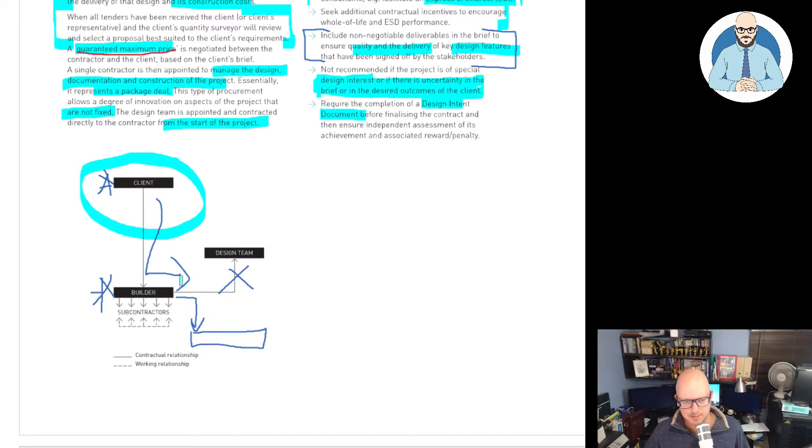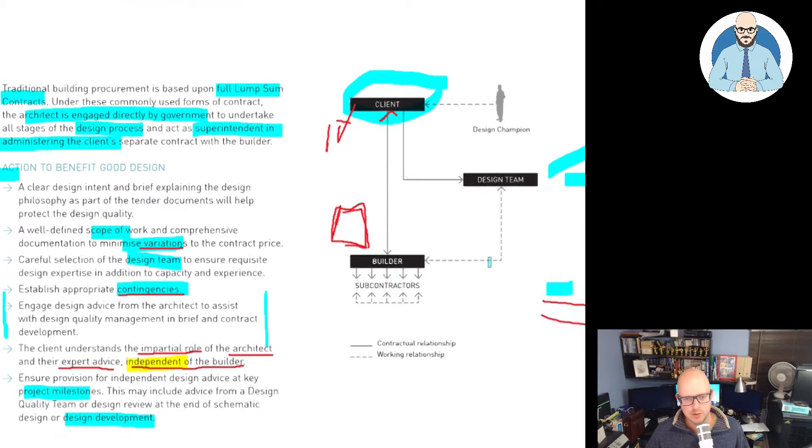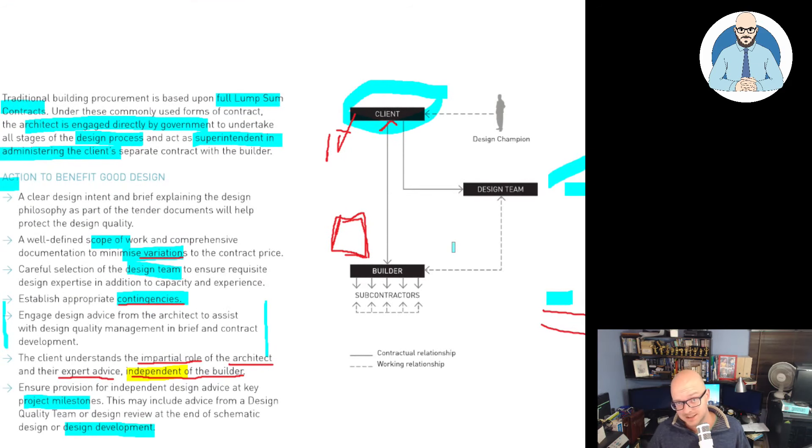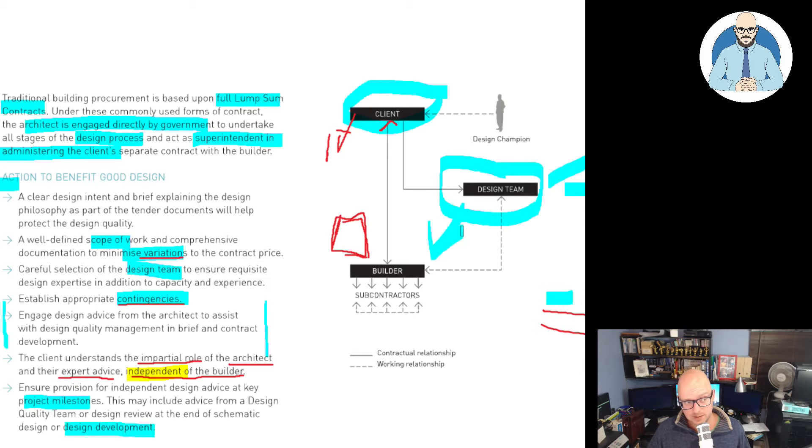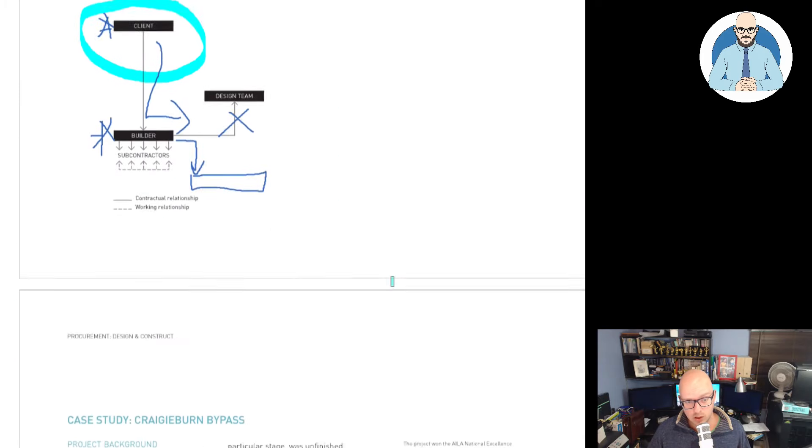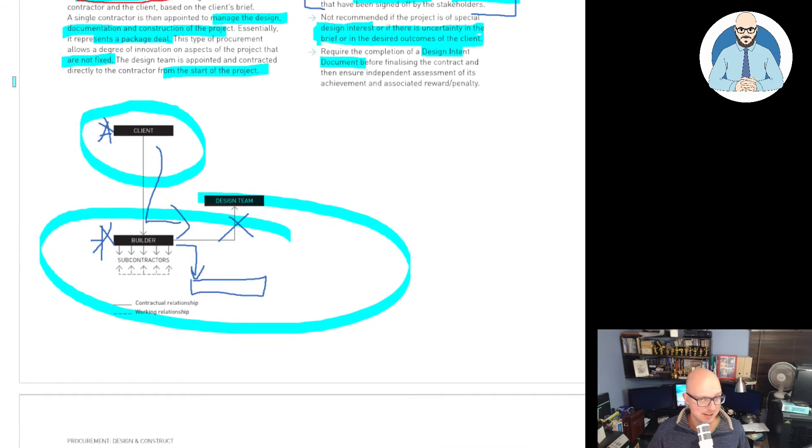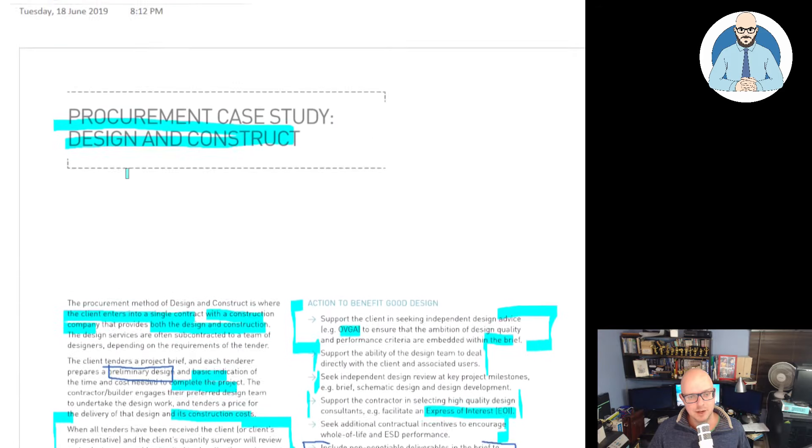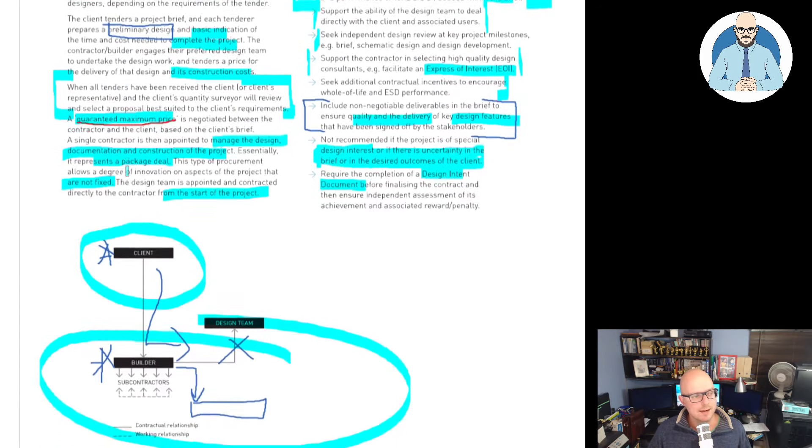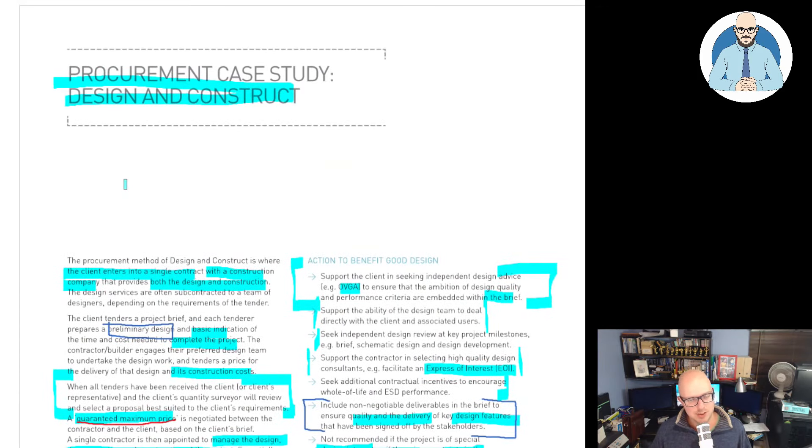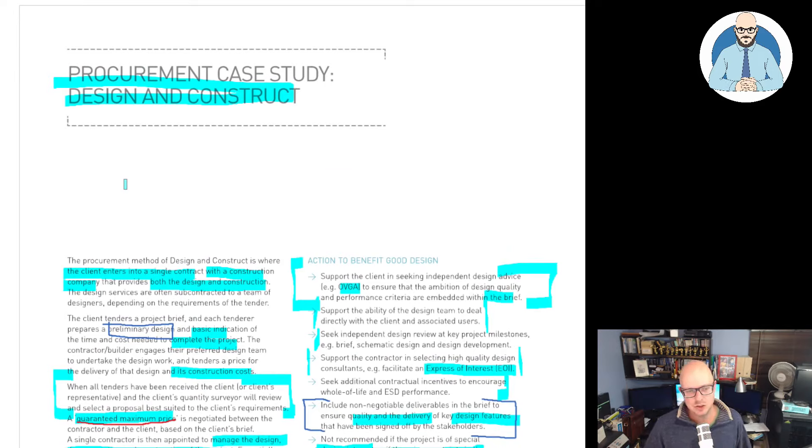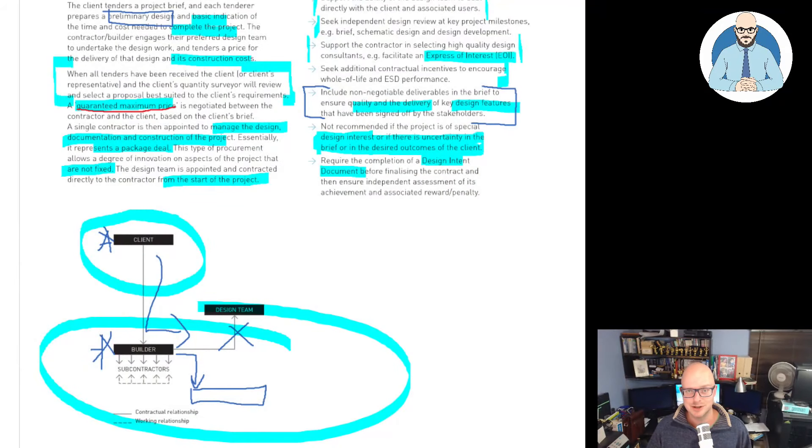When I say there are issues with procurement, I'm concerned with the significant use of design and construct for projects that is not suited for. The developers, the clients, and the banks prefer its reduced level of risk. But it means the original people who were the police, the certifiers, the architects, all of that, who were here checking the builder are now all working for the builder. Even the certifiers, privatized. It can be tough working in this environment. It can work really well depending on the project, but you can often be asked to compromise. You have to learn to say no. You have to learn to risk losing work, which can be tough.